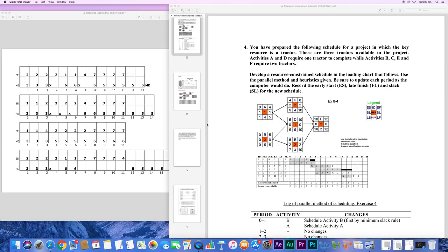In that case, we have to firstly schedule resources, which takes precedence over technological and logical dependencies. However, we still need to obey these technological and logical dependencies that are given in our AON network that we covered in the previous video.